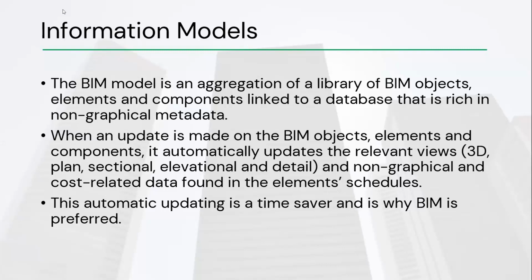And this is the level of detail, the level of development, the level of information that you would need the model authors to put into the model so that when it comes to you, you're able to use that reliably for cost estimation purposes. So that's basically how information models are constructed.